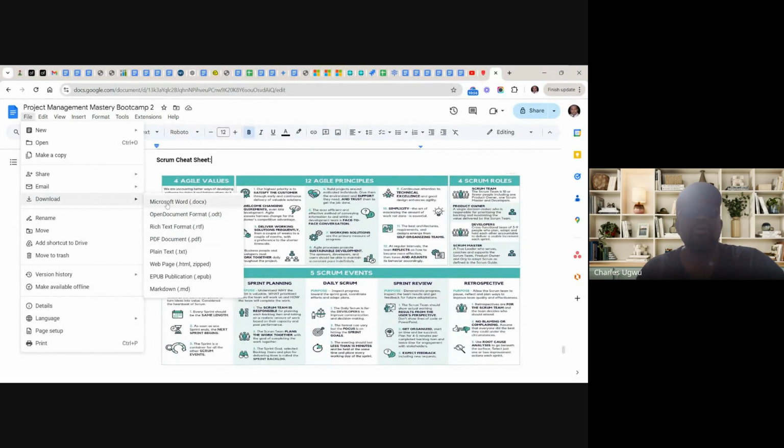So you can click on this and make sure that once you click on it, that is testing, user acceptance testing. That is what you do during the review. You click on it, it downloads. You must click on all of them to see that if you click on this and it doesn't download, then it means there is a bug and it cannot be accepted. Although before you come here, you must have tested this thoroughly before bringing it to the stakeholder. So that is what we do during sprint review.